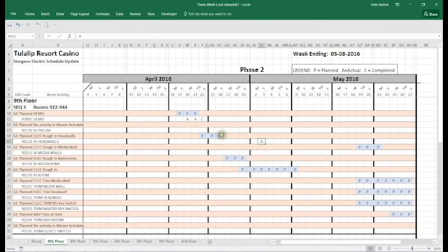And that reason should be that you were unable to complete when you were scheduled to complete it because somebody hadn't finished their work. So then we put a cause and effect to it. Just checking that you had a delay doesn't do anybody much good. But if we know what the delay is and who was responsible for it, that's going to help us out quite a bit, because then we can give the general contractor a much better understanding of what it is we're doing. So I hope all of this is useful for you guys.